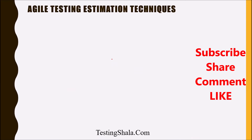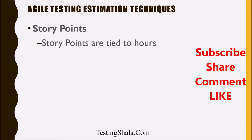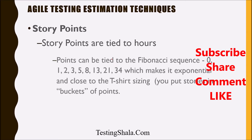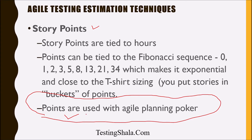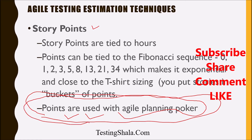The second type of agile testing estimation technique is story point sizing. The story points are tied to man hours. In story point sizing, we normally use the Fibonacci sequence. The Fibonacci series will be 0, 1, 2, 3, 5, 8, 13, 21, 34, and so on, making it exponential and close to t-shirt sizing. Story points are used when doing estimation using agile planning poker.